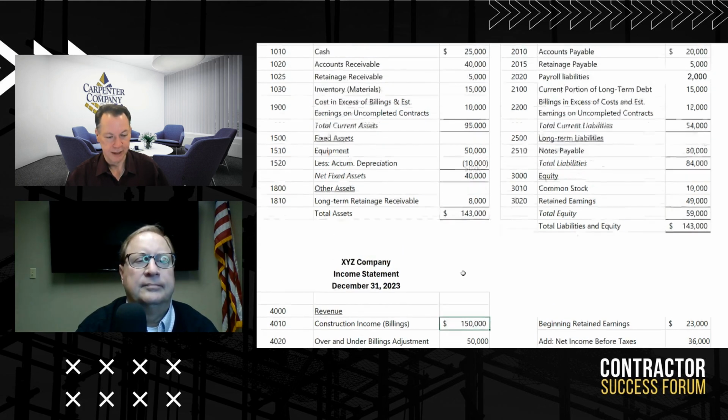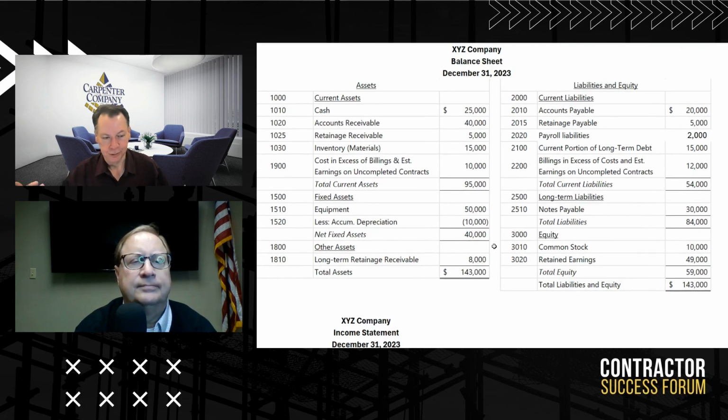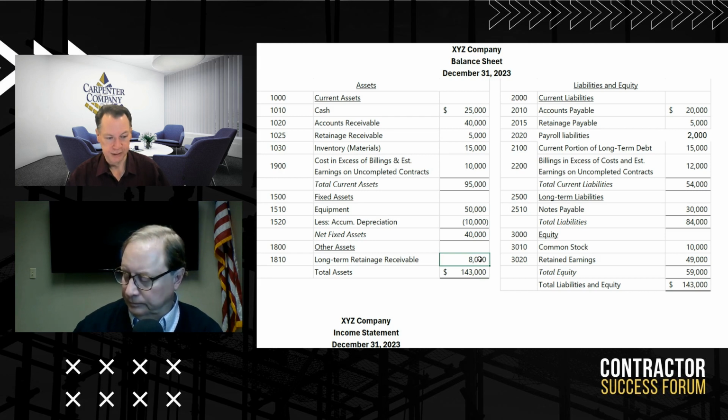You'll notice like things like labor, I've got administrative labor. So somebody is doing your accounting or your office workers. We carve that out because we know that those people are not working on a job. Sometimes there's things that are not cut and dried between the two. You could have also depreciation down here. And if it's depreciation on your computers and your desk and stuff like that, that's one thing that would go down here. But if it is depreciation on your equipment, if you got heavy yellow iron, that can be a huge cost that you're missing by not allocating those things to the job.